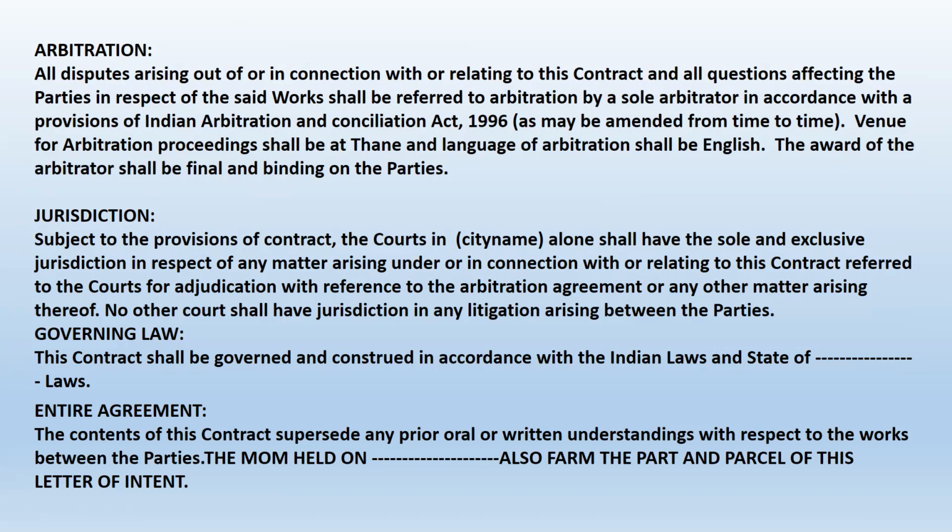Moreover, you have to mention the jurisdiction of any legal claim. Suppose you are working in Mumbai and somebody wants to file a case in Delhi, it will not be workable. So in the contract itself, you have to mention which city the jurisdiction of the case should be in, and all these things have to be mentioned.